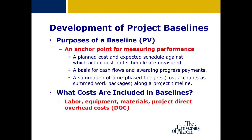The importance of a project baseline is critical as an anchor point to monitor the project throughout its life. The baseline is used as a summation for time-phase budgets to monitor project status and to determine payments for progress-based projects. Usually only direct costs — labor, materials, and equipment — are included in the baseline, as these are directly under the control of the project manager. Indirect costs like rent and insurance are not typically used to calculate the baseline planned value since they're not directly chargeable to specific tasks.